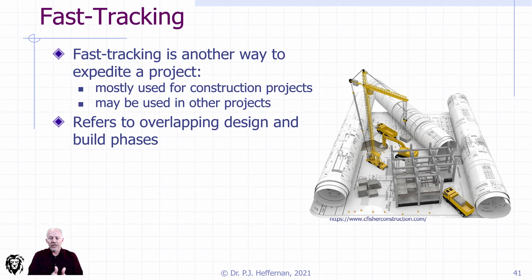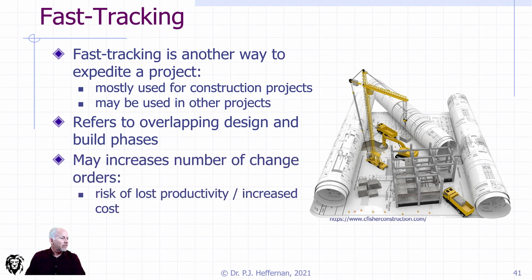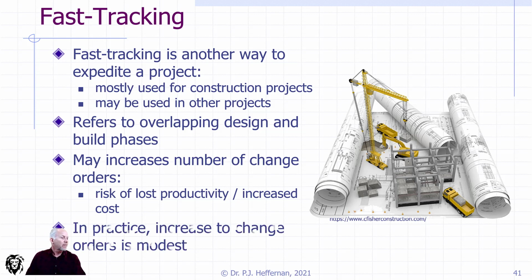And so you can accelerate the pace of output by changing the table of norms that you apply to how you execute your various project activities. That's typically the way I think of fast tracking: to make more expensive choices because the time constraints of the project benefit from it, and we apply that across the board, or through a subtask, or whatever.